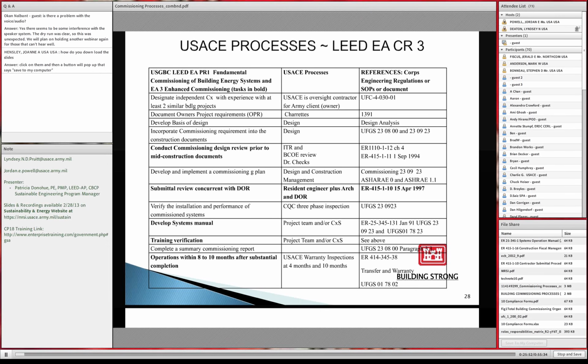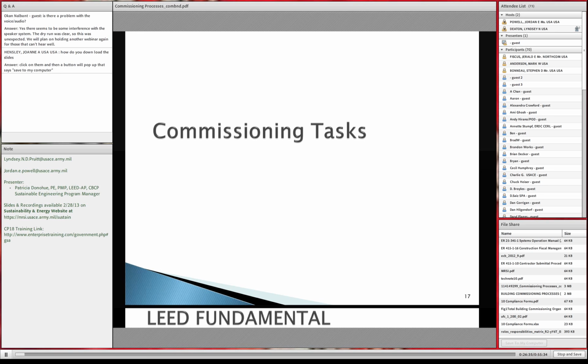We're also debating whether or not LEED enhanced commissioning is a requirement, because what Ms. Hammock had said was total building commissioning and whole building commissioning, and her comment had said that enhanced commissioning process activities must be planned and budgeted. So we're not sure if she actually meant enhanced commissioning in accordance with LEED, or just enhanced commissioning because she added building envelopes, stormwater management, water treatment systems, and information technology systems. So it really comes down to what you're building, what energy system needs to be checked and verified. I know it's kind of a non-answer, but there's no clear path to follow to ensure that you're getting what you need, because it's project by project. And the best path to follow that I'm trying to impress on you is that you have to have a commissioning team look at it at the pre-design and design phase in order to actually make sure that you're getting the commissioning that you need for that building.